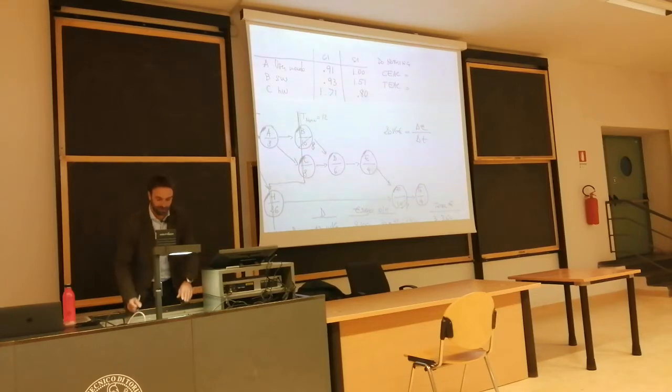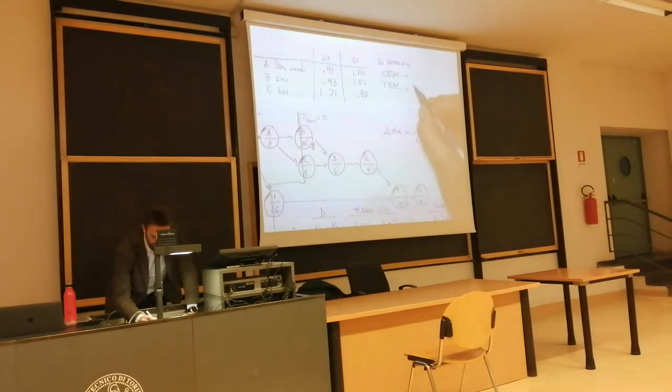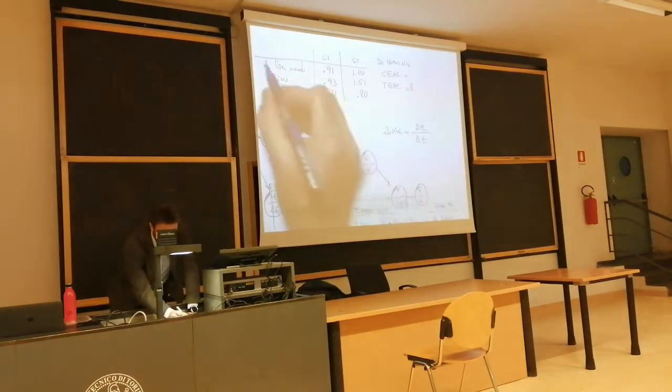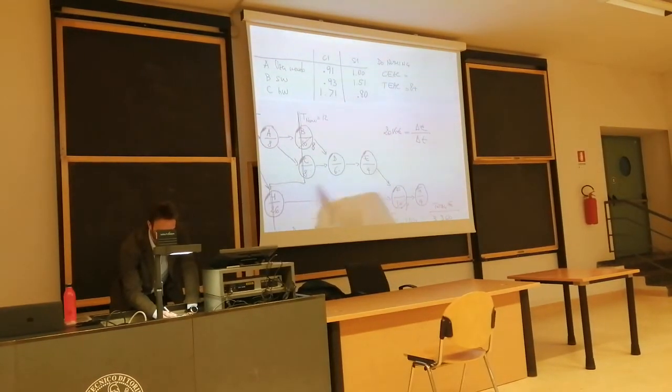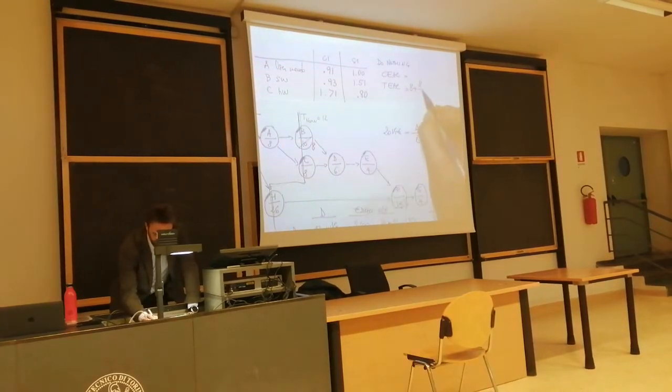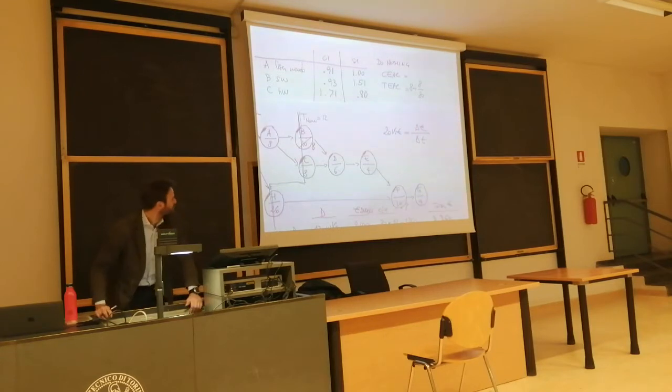So it's going to be 8, which was on time, A, plus the duration of B or C, the longest. The C is critical. So it's 8 over 0.80 plus D. How long is going to be D?